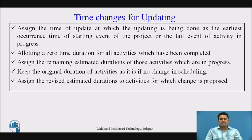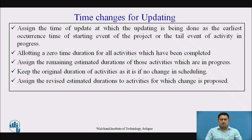The time changes for the updating are: first, assign the time of the update — the date on which the updating is to be done. That will be the earliest occurrence time of the starting event of the project, or the tail event of the activity which is in progress. Allocate zero time duration for the activities which are already completed, and assign the remaining time estimate durations to the activities which are in progress or change the activity duration as per requirement.